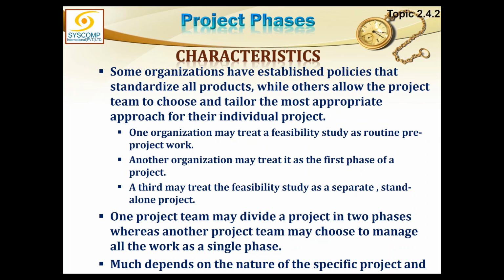So every phase I have to seek permission. To start every phase, I have to seek permission. To close every phase, I have to seek permission, approval. Without that, I can't move ahead in the project. And this is the kind of control which I was talking about in governance. This is one kind of control you exercise. The most rugged control is this one.